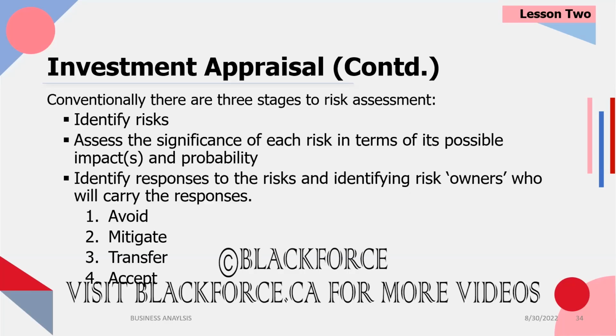Okay? The probability of the risk. And if it happens, what impact will it have? If 10 people quit in the accounting department all of a sudden because they feel threatened, what is the fallback plan for that? What impact is it going to have on the department? And how will that be addressed?